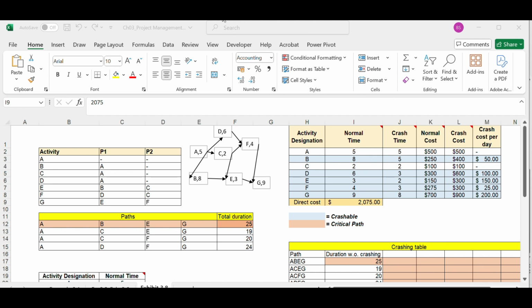While we do the resource leveling, we will have to do multitasking. New critical paths might be created, and old critical paths might become non-critical. We might have a loss of flexibility due to slack utilization, etc.